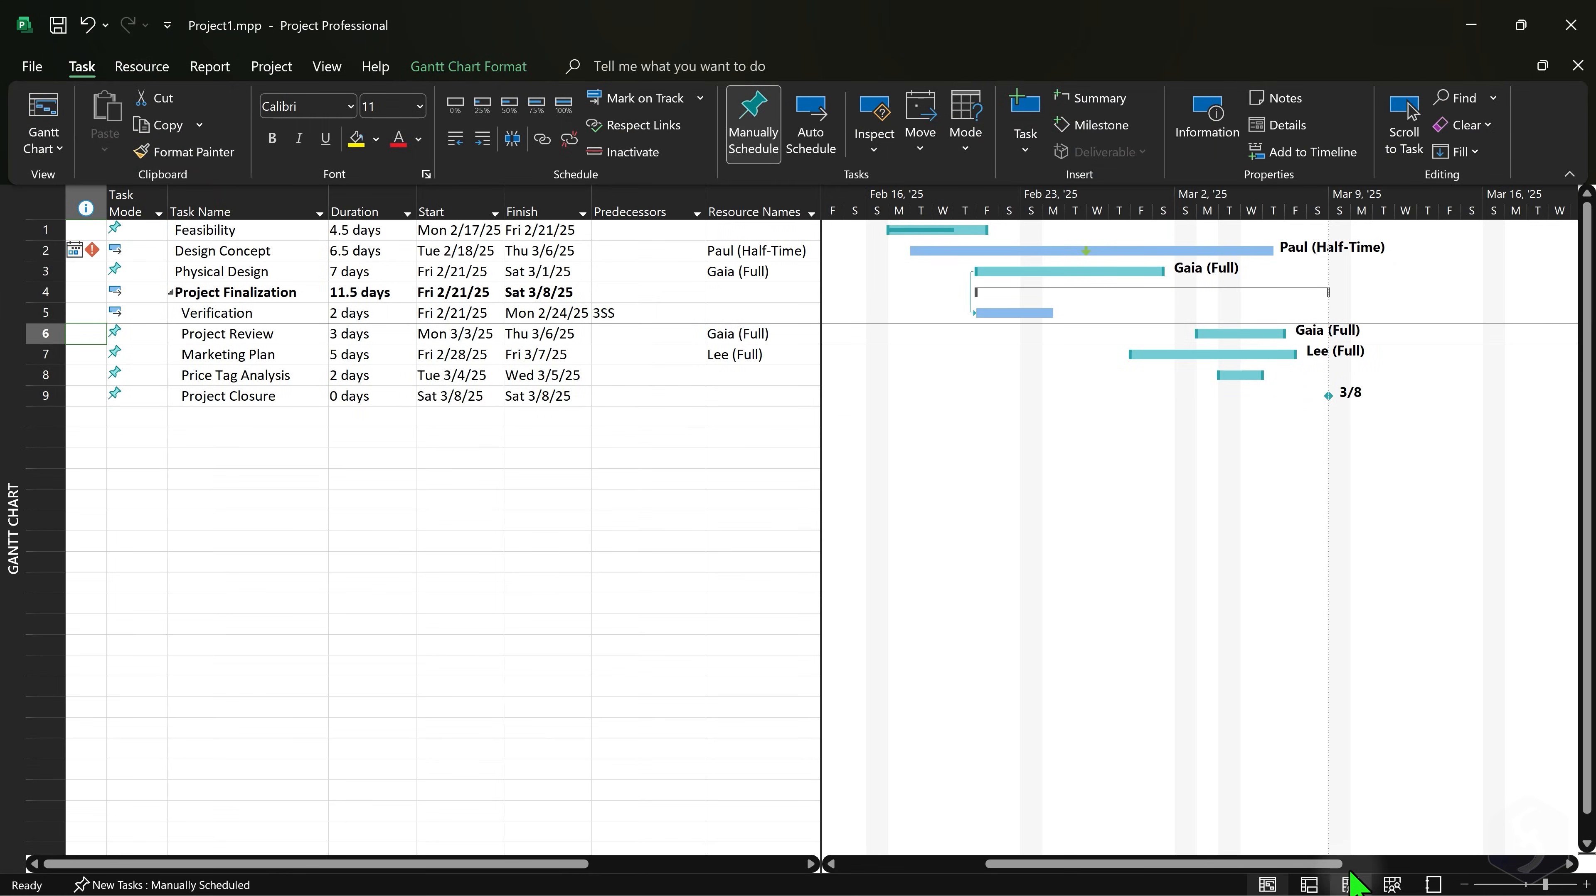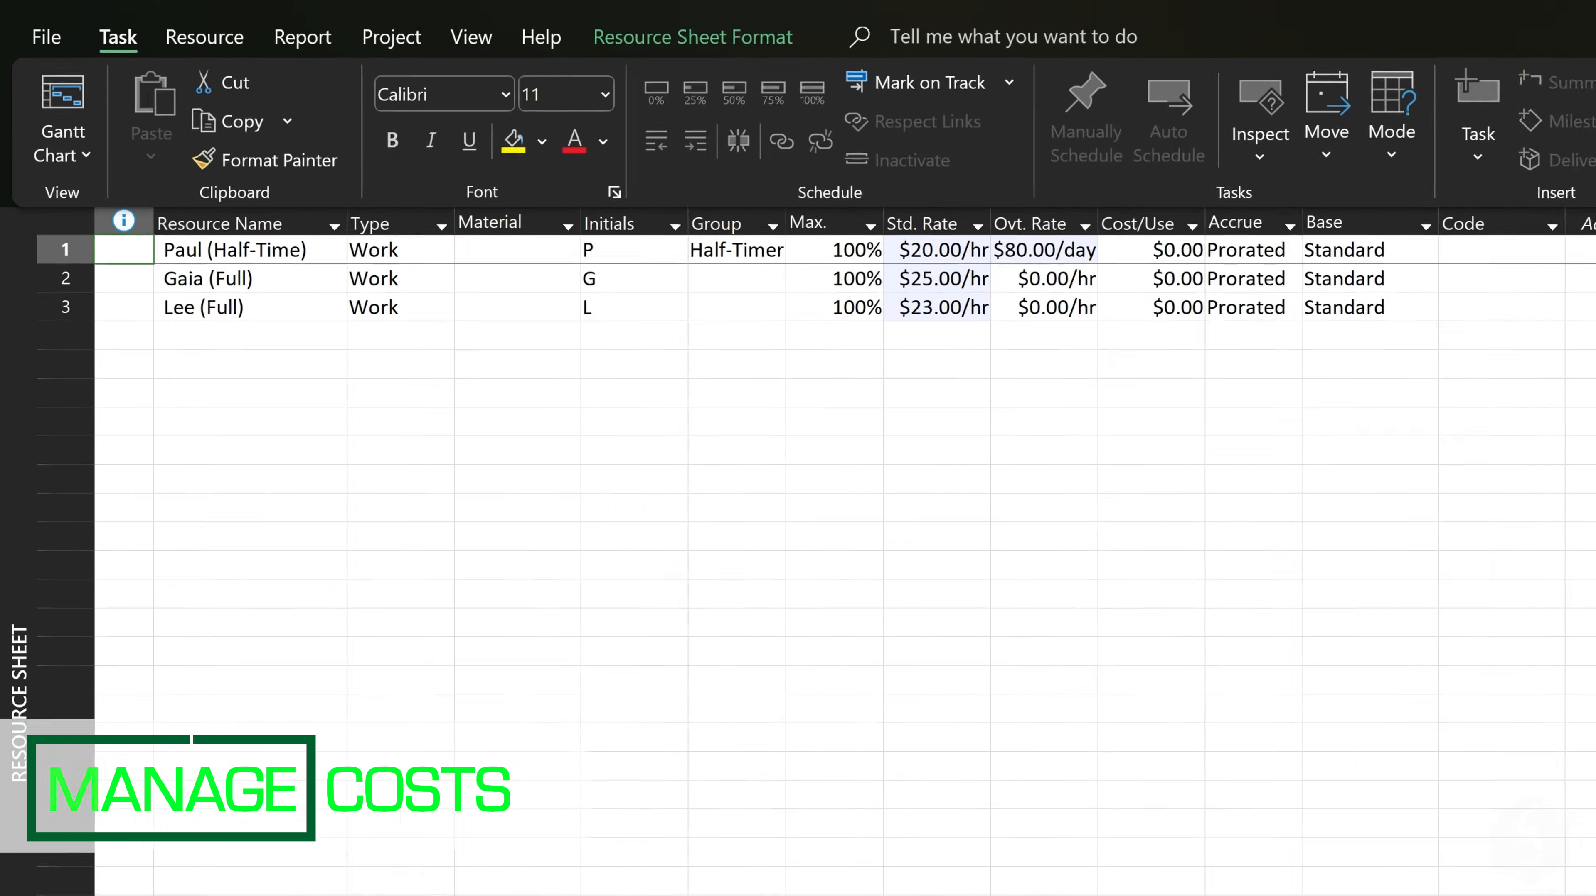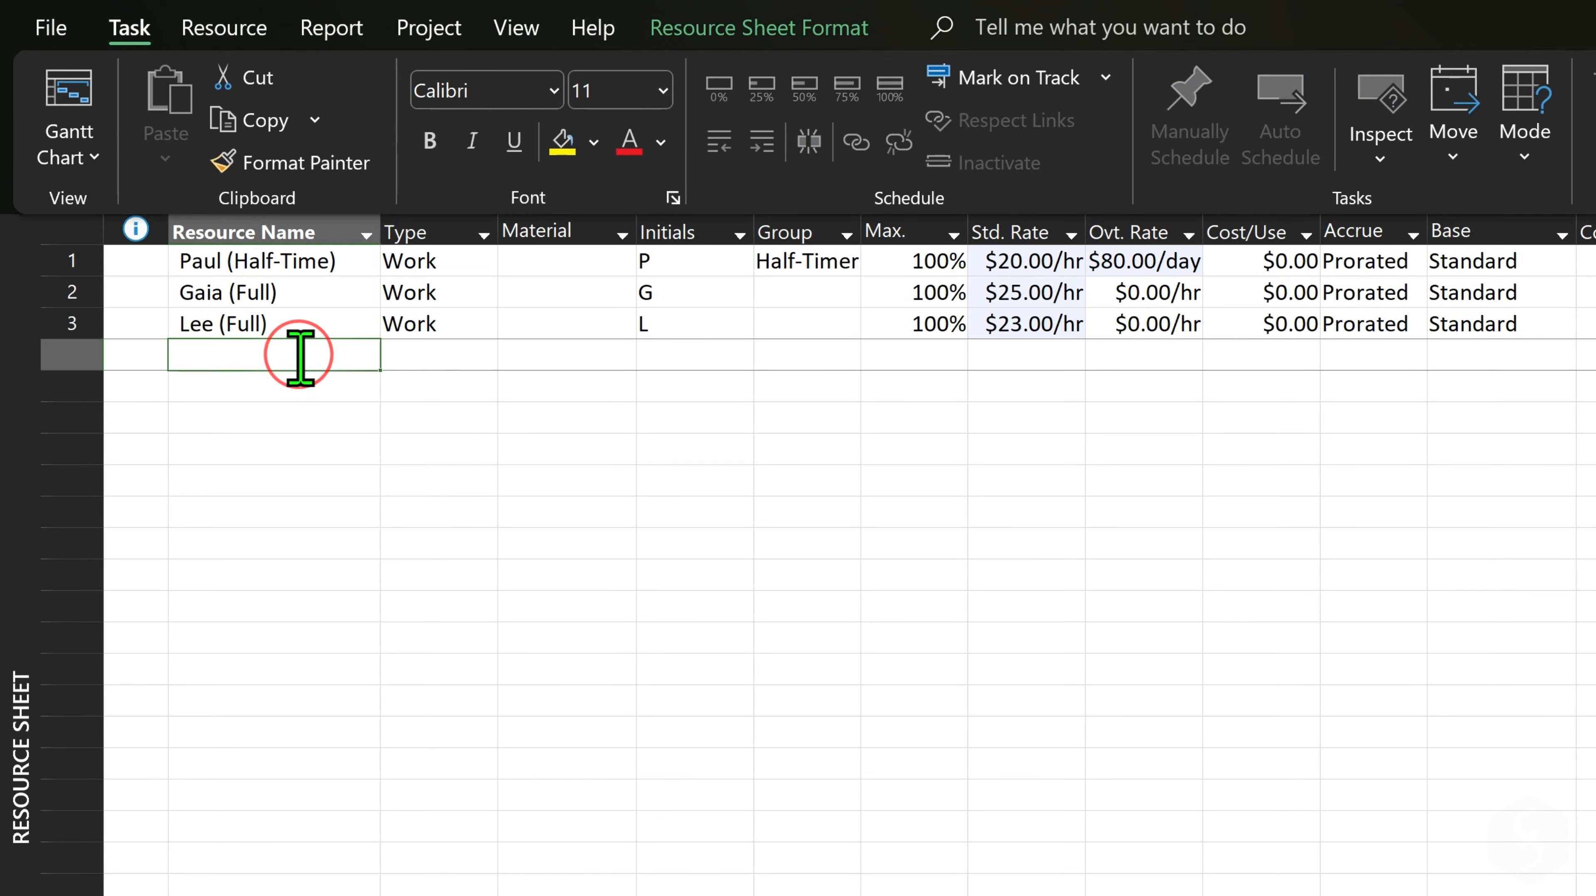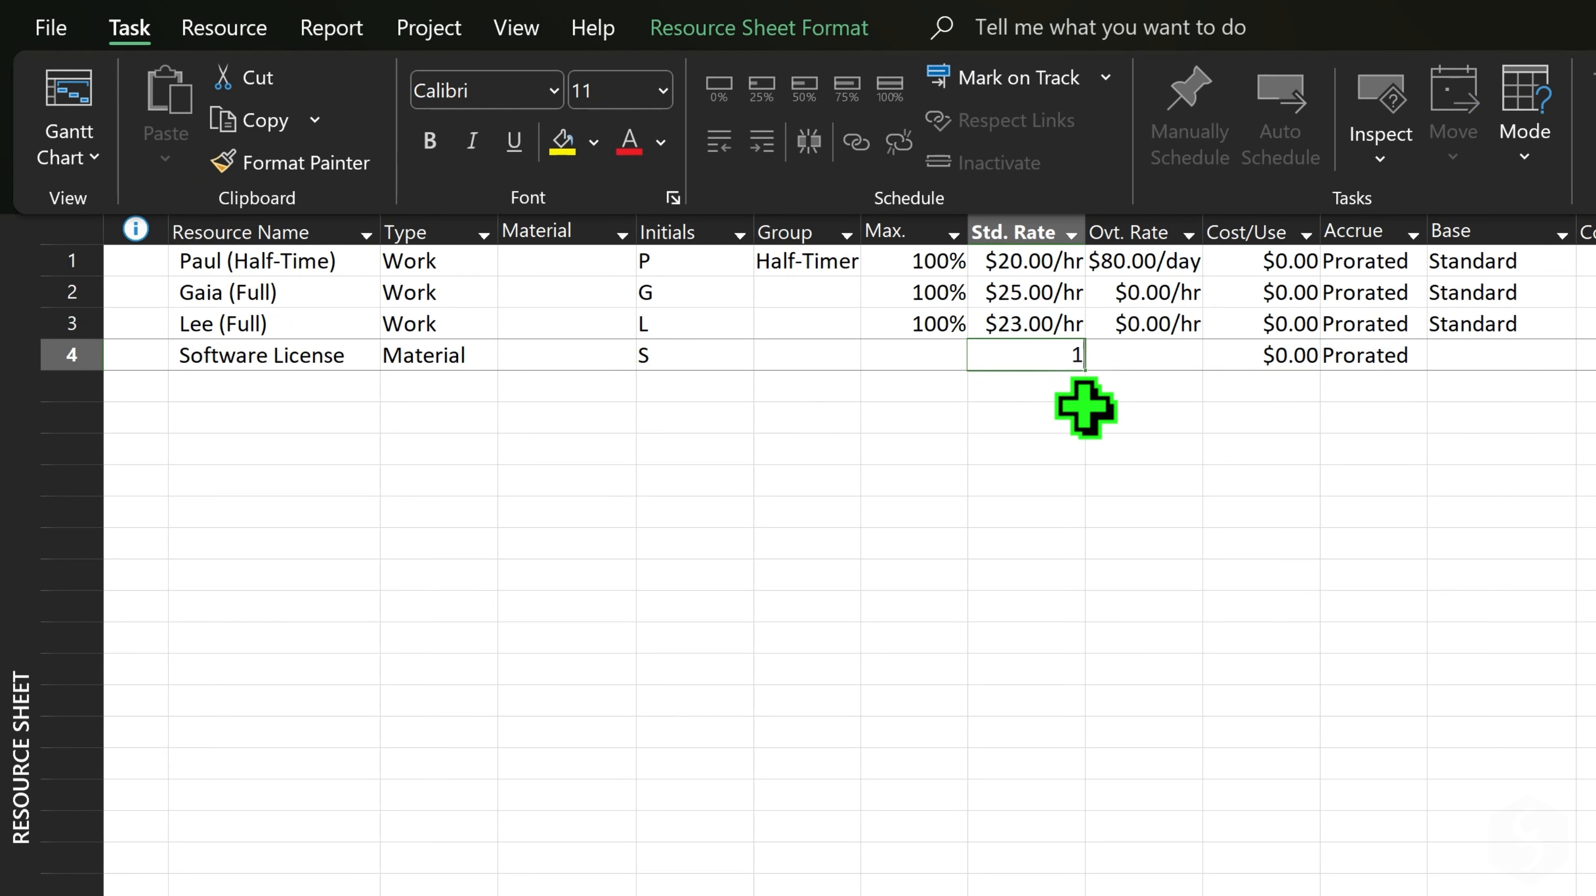Switch to the Resource Sheet workspace to manage the project costs. Besides your team member wages, include materials and other expenses by entering new rows.